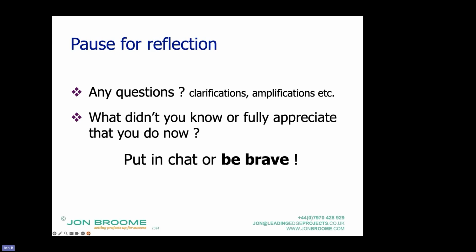It's clarified to some extent by the contract stating what information they need to have taken into account, but it's still a subjective call. So if it's completely out of the blue, no one expected it, yes, it would be a compensation event. If it's, well, we didn't know it was there, but we knew it was somewhere around, that's a judgment call. If, on the other hand, it was a client design job and their design didn't work, then the client, through their project manager, would have to change the scope, and that is a compensation event.